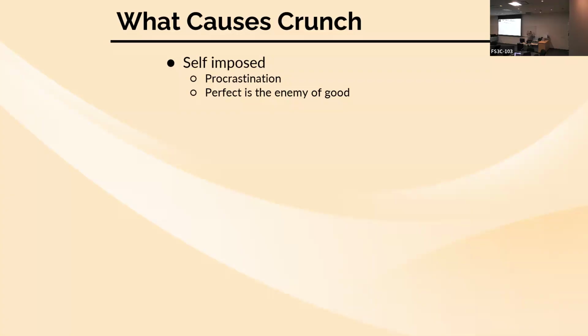That's where you know this task is going to take you 10 hours to get done, and you know you have a week to get it done, which means you're going to start working on it 10 hours before it's due. That's going to cause you to have to crunch and have long, terrible weekends if it suddenly takes more than those 10 hours, if your estimate was wrong. Now you're going to have to burn yourself out, push yourself through things in a way you didn't expect, or you're just going to miss your dates, and that's going to be bad as well.